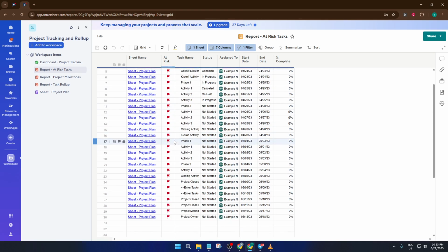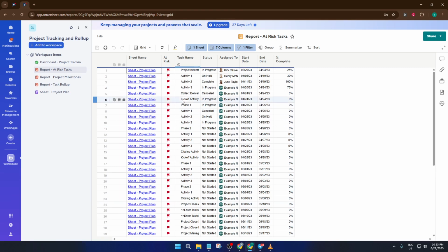While you're here, take a look at additional columns like Status, Assigned To, and the Date fields. The Status column tells you the current state of each risk or issue, and it helps you prioritize which ones need urgent attention. Assigned To is super useful. It shows who is responsible for resolving that particular risk or issue, so there's never any confusion about ownership. And those Date columns, they help track when a risk was identified, when it needs to be resolved, and can even tell you if something's overdue. If you're working in a team, this visibility goes a long way toward accountability and transparency.